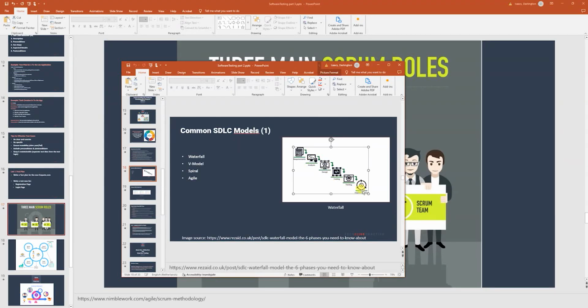When analysis is busy, design and all these people have to wait. So this waterfall is not really a very efficient model, because you might be waiting and not doing work for months because the team above you has not finished their work yet. That's a waste of money, a waste of time, and it makes the project take longer to finish. So that's why Agile is shining.